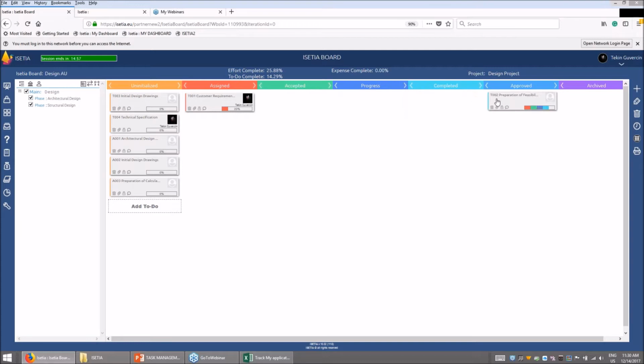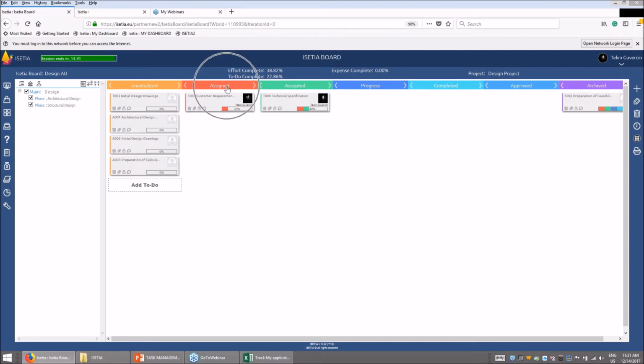Completed, approved 99%, and archive 100%. So this is an excellent way of entering the progress, so that you don't let people enter manual progress. When the stage is moving, you will immediately get the progress. Procurement activities, excellent example when you make it the program. Design activities, excellent example. So for each stage you can apply auto progress. Alright? This is the second example.